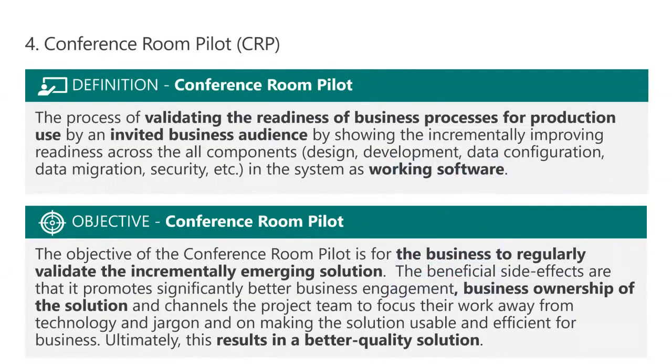Validating via the conference room pilot. This is a key step, and I've seen projects sometimes at the end of the sprint, especially if they're a little bit behind, think, oh, maybe I can skip the conference room pilot. I'll catch up with it on the next sprint. Don't do that. The sprint is not complete until you've done the conference room pilot. The conference room pilot is part of the sprint, and the sprint ends when the conference room pilot is done.